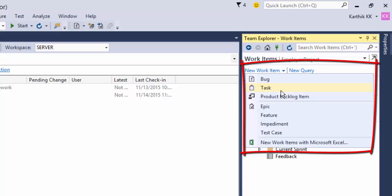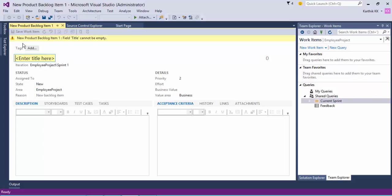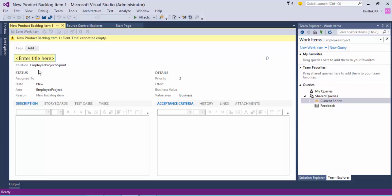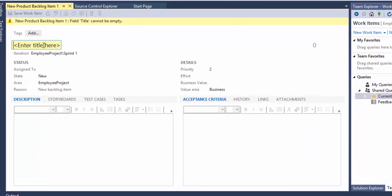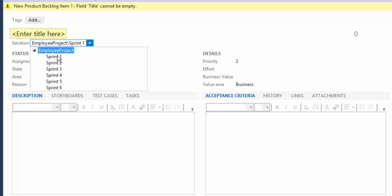If you click new work item, you can see the options we saw in our slides — you can create a bug, a task, or a product backlog item. In this video we're going to create a product backlog item. Clicking it opens a new PBI form. As you can see, there are different properties available for this product backlog item. The first is the title, and you can also choose the iteration — sprint one, sprint two, or sprint three — to assign your PBI to a particular sprint. You can add or modify sprints from the Team Foundation Server web portal.